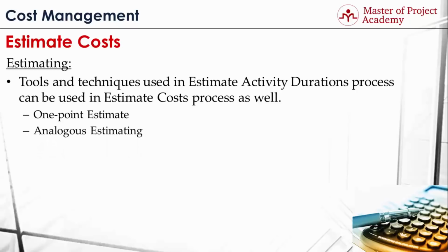Analogous estimating technique is used to compare a similar activity that was performed in a previous project. For instance, if a similar development task cost $1,500 in a previous project, this value can be considered when providing estimation for the similar activity in the new project.